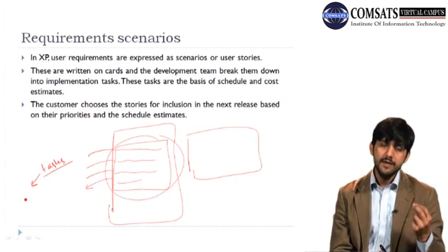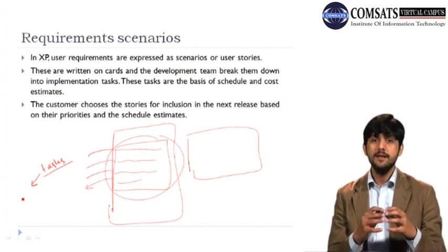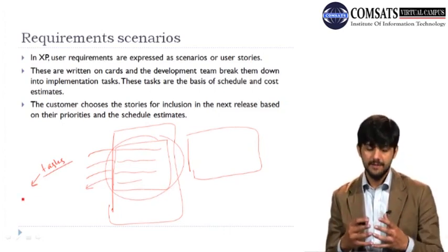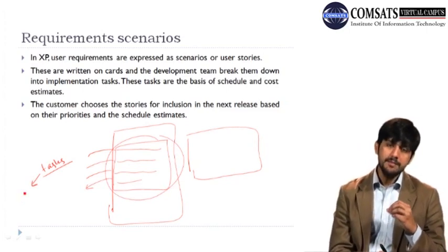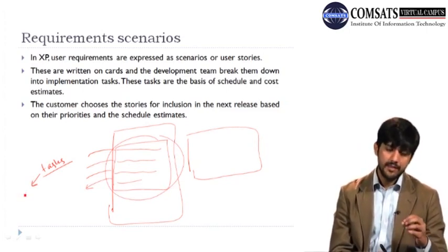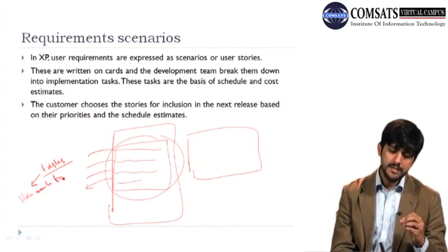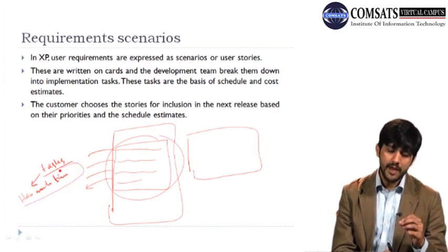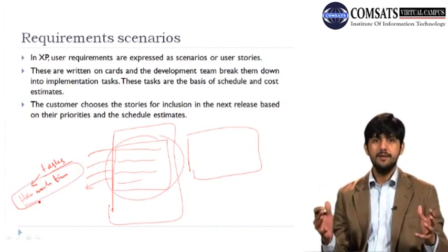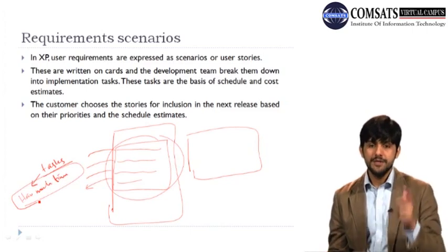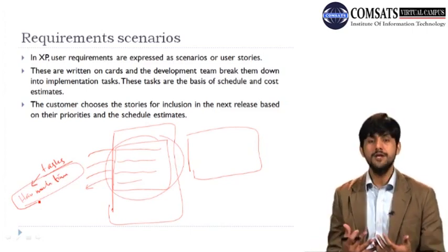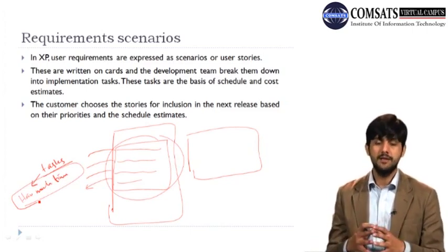and different team members, as we said, the emphasis is more on people. So all the teams sit together with the project manager, and they decide how much time each task is going to take, and on the basis of that they plan the whole iteration. And so the life of the project manager is a lot easier in agile methodology.